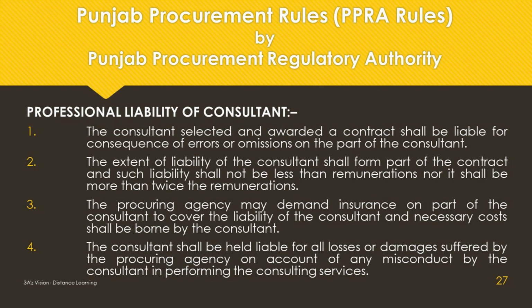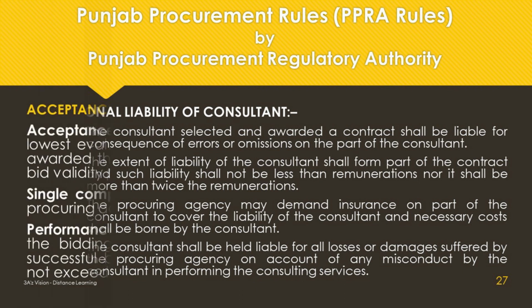The procuring agency may demand insurance on the part of the consultant to cover the liability of the consultant, and necessary costs shall be borne by the consultant. The consultant shall be held liable for all losses or damages suffered by the procuring agency on account of any misconduct by the consultant in performing the consulting services.